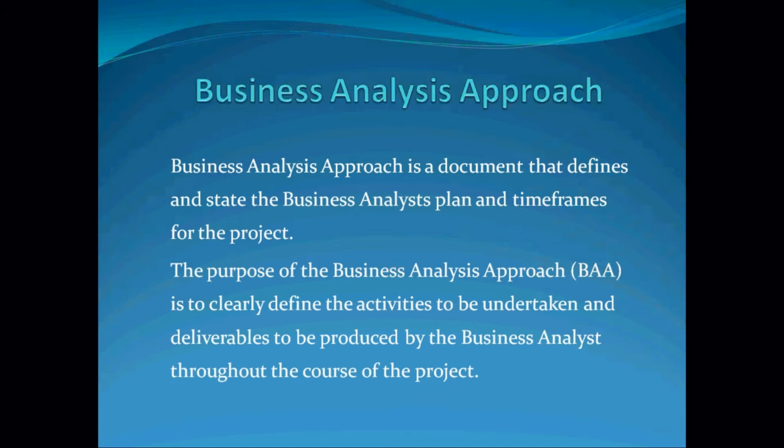So if the PM and yourself agree that these are the two deliverables expected of you at the end of that project, then you have another section that will say the timeline. For your BA deliverable, they will expect you to put a time saying BRD. For the BRD, maybe you are going to do that for 3 weeks, maybe from March 23rd to April 22nd.